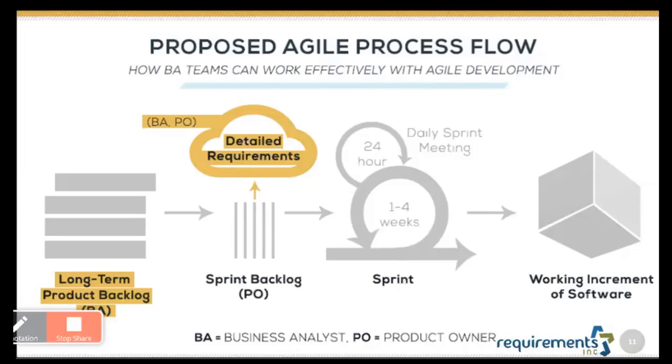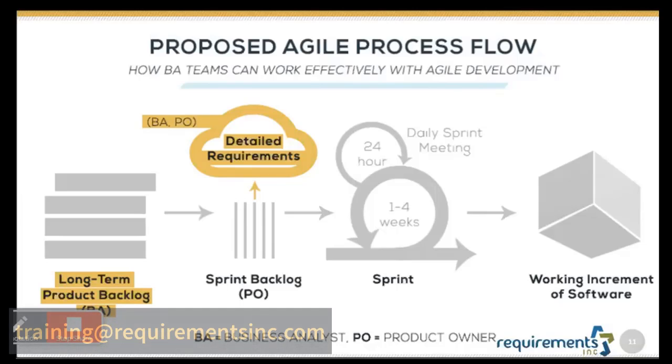And then when we say ship ready, what is the technical term for that? It's called definition of done. What would render my item, the first box, right? What would make it done? Definition of done. So every team, every sprint team has an understanding about what it means to be done. What are the things that need to be squared away? Of course, it has to be tested, right? Things like that. So what are the things that you consider important before it can be considered done?